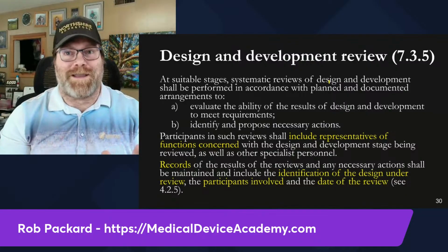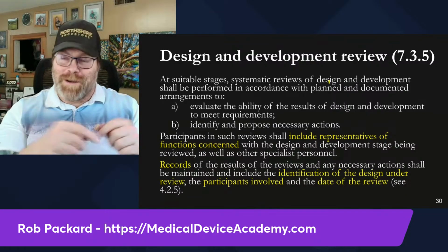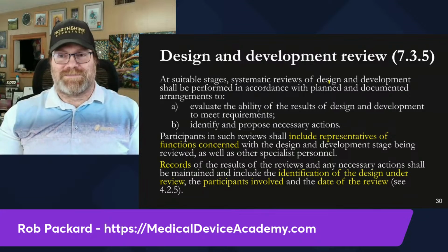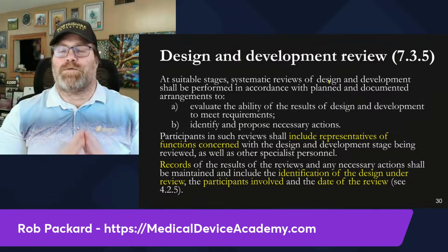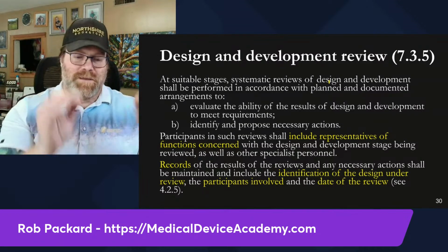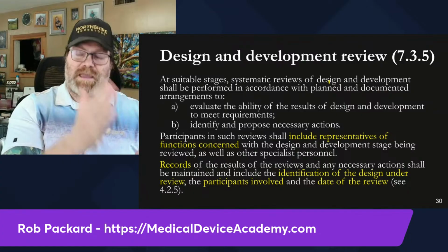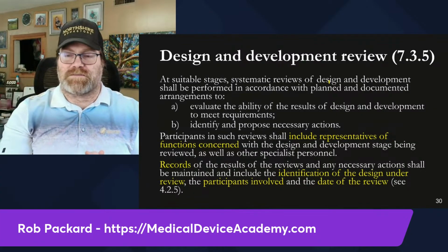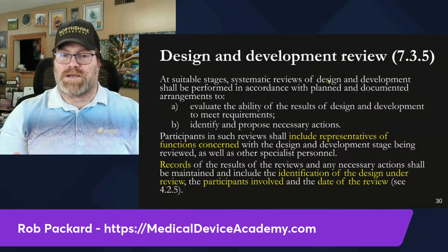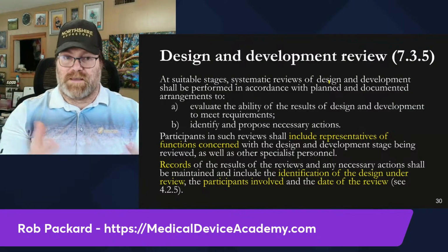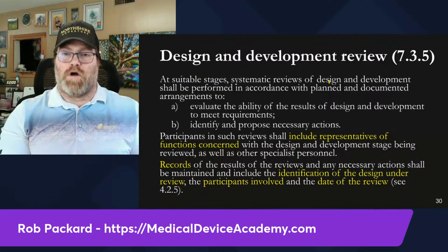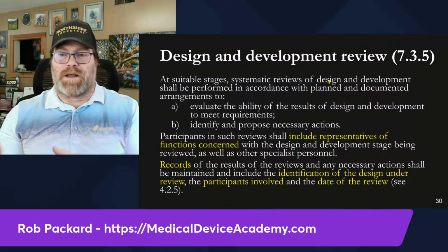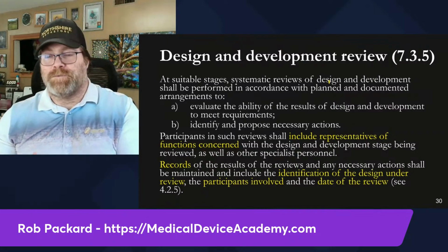It's not required. And I even brought up that we're not actually required to do one at every single one of these phases. He says, yes, but that's how I'm going to manage it. My boss said, we're going to have a phase gate and we're going to have all deliverables done by that, or we will not go forward to the next phase. He was developing different projects at the same time, and he wanted to make sure all our ducks were in a row before we went to the next phase. He didn't want to get surprised by something that was half done.